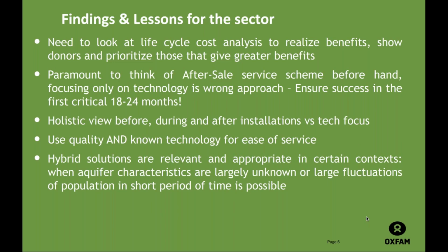Also, when it comes to implementation, implementers should pay attention to after-sales support and ensure success in the critical first 18 to 24 months of the system by ensuring there's an after-sales support plan to support the system. They should also opt to use quality and known products so that there is ease of service. Next.